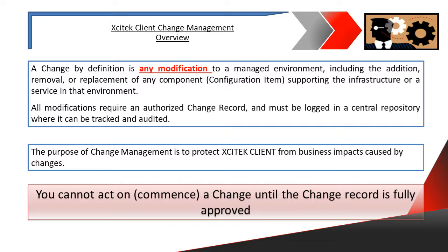So the purpose of change management is to protect the client from business impact caused by changes. There is a very big notation here: you cannot act on a change until the change record is fully approved. So these are the basic things.